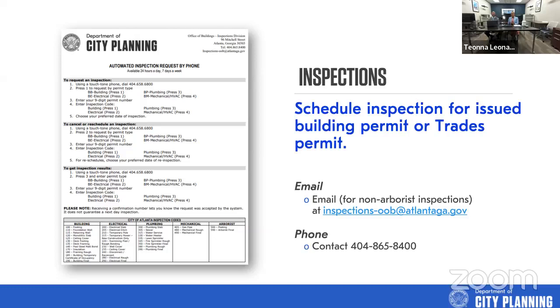In addition to that, we do review third-party inspection reports. However, we do not check or inspect third-party inspectors' work. We only inspect their reports. So with that being said, quote unquote, buyer beware. If your contractor is pushing you to do a third-party inspection, you can always call in an inspection from the City of Atlanta's inspectors.